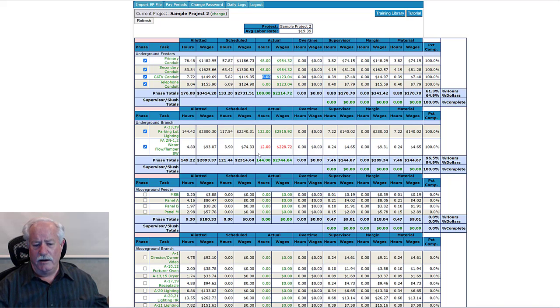So you can see here that, yes, we did go over in dollars and hours. We had 4.8 hours, we used 12. We had $93, we used 228. But we still completed the phase of construction on budget, right?